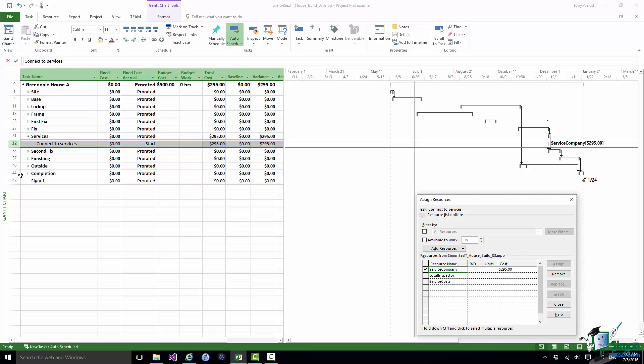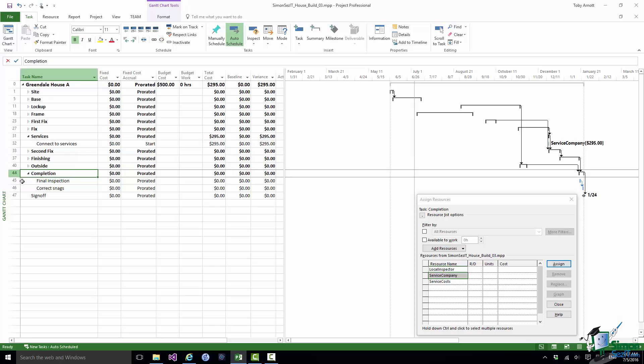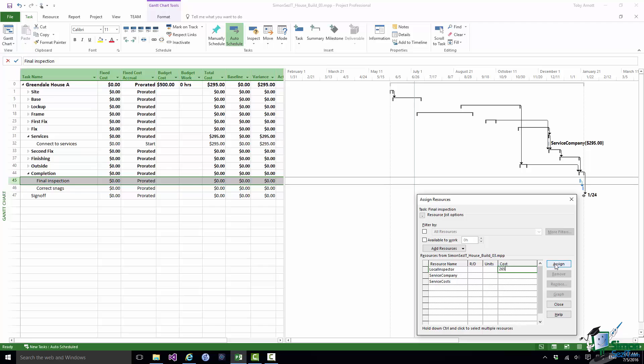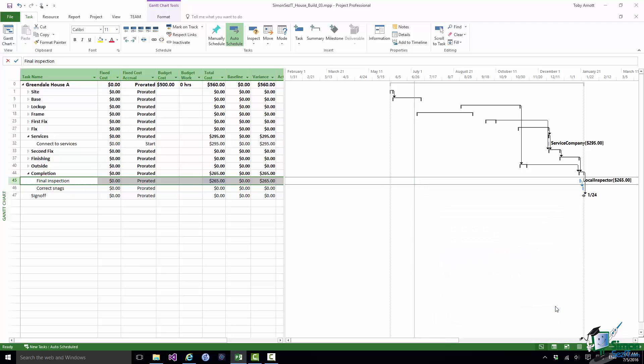Notice how the cost is updated in the cost table against that task. And then under the completion summary task final inspection, one of the resources on the final inspection will be the local inspector and the cost charged by the local inspector is $265. So against my original budget of $500 I've now got two specific costs. Don't forget you could do this for many categories of cost and work and I'm only demonstrating it with one.